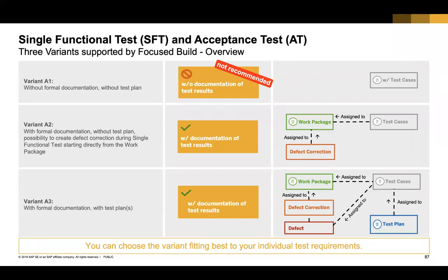What is also important is that test cases have to be assigned to work packages, right? This creates the traceability link that is needed, because so far we have a relationship between process to requirement to work package. Now, test cases have to be assigned to work packages as well, so that when this test case is tested, we know whether a particular requirement is tested or not. For requirements testability, this dotted line that you see here is extremely important, which is assigning the test cases to work packages.